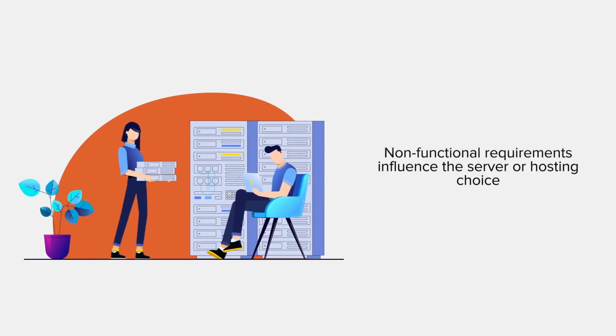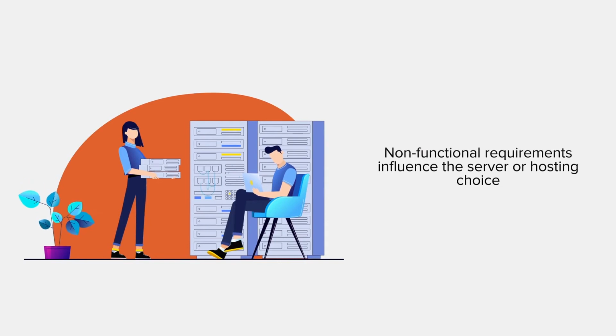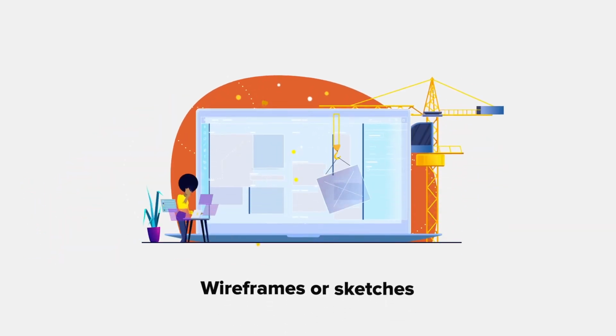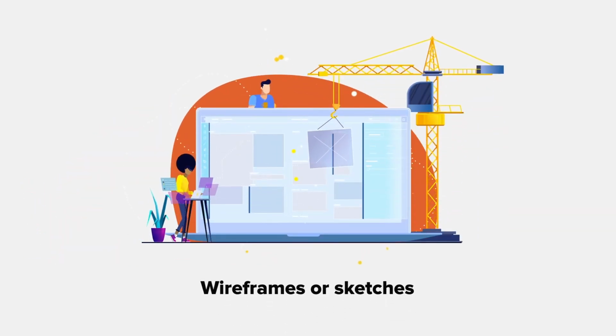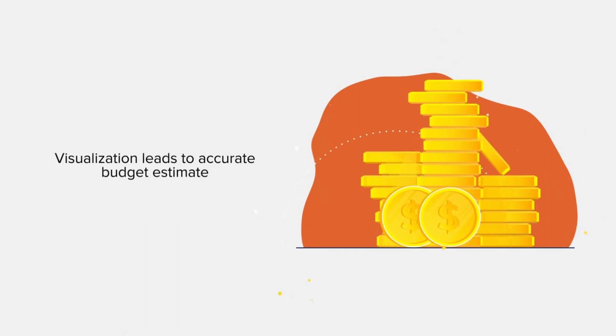and it may require expensive cloud infrastructure worth hundreds of thousands of dollars on later business stages. Visualization of the idea is the best way to avoid any kind of miscommunication between the client and the vendor when it comes to product development. Investing in wireframes or sketches will help you get a more accurate budget estimate.